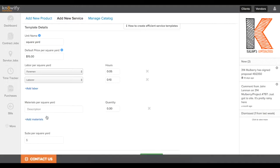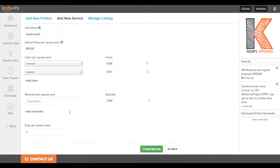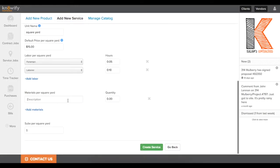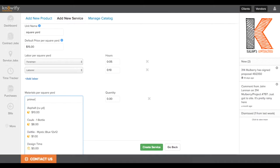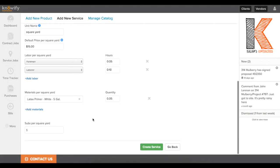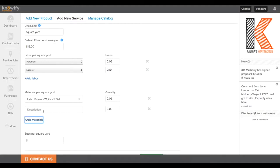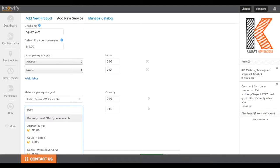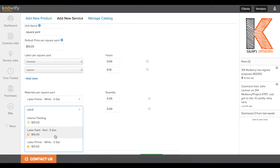I'll start with primer, and it's an entire bucket, so I don't need a bucket per each square yard. I'll say I need, let's say five hundredths of a bucket. This is just for the sake of estimating how many buckets I'm going to end up needing, and it gives me a little bit more information when I'm doing my budgeting later on.